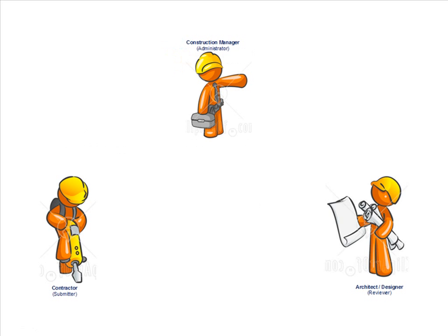The first is the construction manager. It's his responsibility to create a submittal registry which contains all of the items that the different submitters have to send in for approval. The second is the contractor.